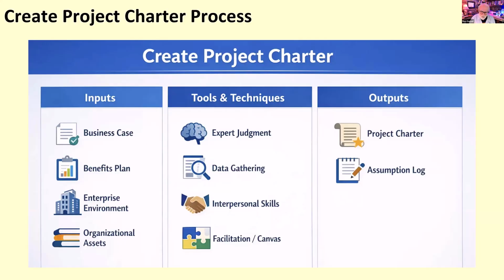And then organizational process assets are artifacts usually from just operation of the organization. So it could be that we've done a similar project in the past and we have their artifacts archived someplace that can help us maybe identify risk early, identify schedule problems, things like that. So these are also things that affect our project, like procurement requirements, quality requirements, regulatory, how the organization has implemented regulatory requirements. All those things need to come into this.